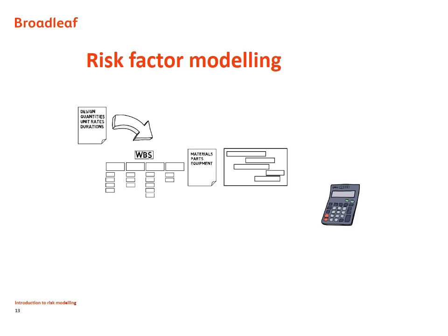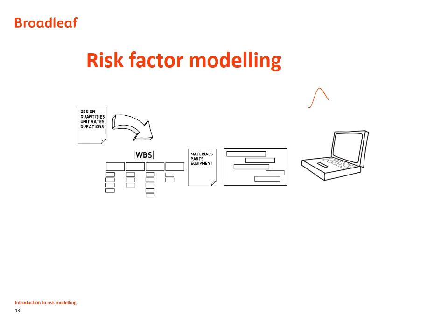Now I want to go back to the original estimate and think about what a computer can do for us over and above basic arithmetic. Imagine that there is a factor that affects the cost and is uncertain, perhaps the project duration or the size of a software system that isn't clear at the time the estimate's being prepared. We can use the same approach as we do for quick what-if analysis to understand the effect of the uncertainty in this factor on the total cost.